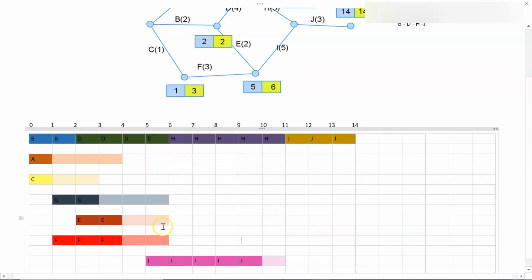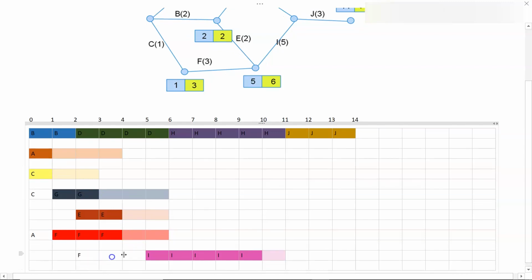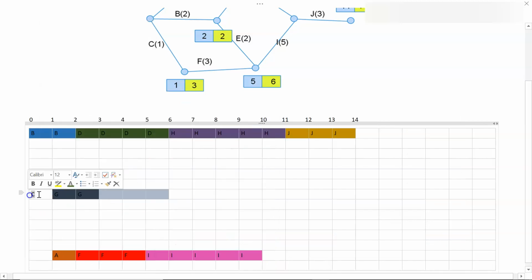Once you've got all your non-essential activities in, then you can rearrange them to find out how many workers you need at the time. So just play around by sliding them up and down and see how many you can fit in. So we can see that there is only a need for 3 workers here. You may have rearranged it slightly differently, which is fine, but you should have still got that there only needs to be 3 workers in total to complete this job.